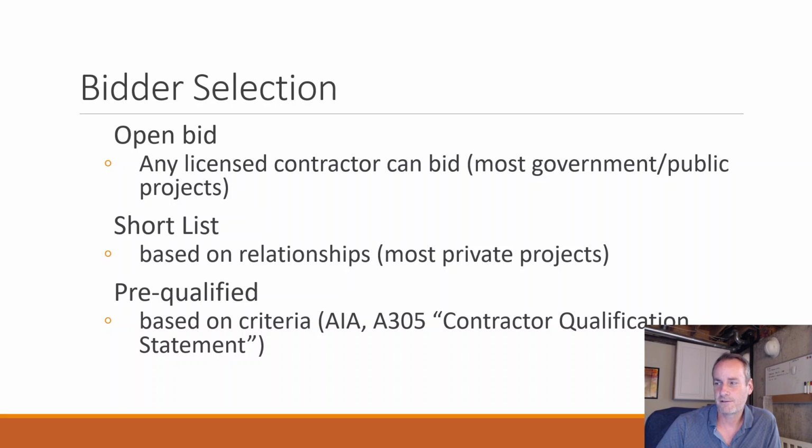There's no reason to rule out anyone else as long as they are licensed contractors. Basically, the idea is that anyone who is a licensed contractor can bid on that project. Lowest bid gets it, because once again, if you don't take the lowest bid, then there could be questions of favoritism or possibly prejudice in how certain contractors were selected.